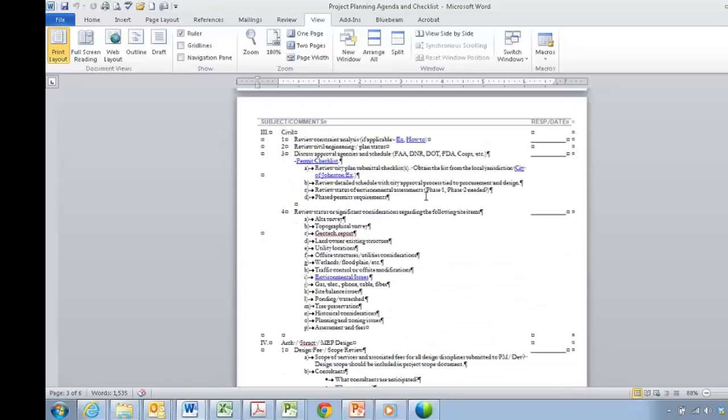Then we can begin to get into, and this is where again it gets to be more customized based on deal to deal, we can go and break down the project based on its components. So you start off with the civil. Now, again, this comes down to what you know about your job. But let's say you're starting fresh. I mean, this is essentially almost a due diligence effort. What's the status of design? What do we know about the site? How are we going to approach the site? What's required? What are all its entitlements and city approvals required to get the job done? You're essentially identifying any roadblock that could prevent construction from occurring, and also assigning the responsibility and the roadmap to making sure it can be approached accordingly.